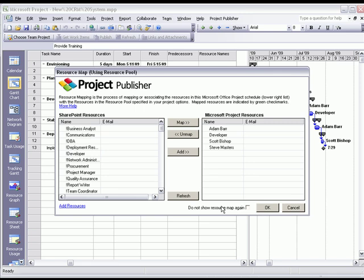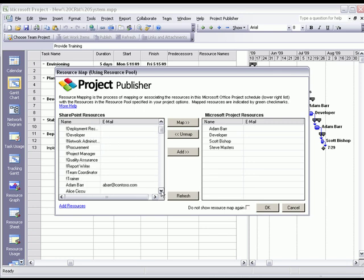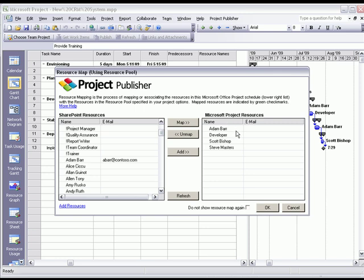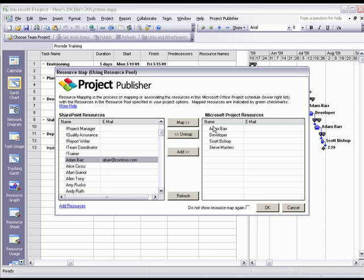Now the next step is to map your Microsoft Project local resources to the resources in EPM Live. The resources listed here on the left are in the EPM Live resource pool, and the resources here on the right are in this local Microsoft project plan. So what we're going to do is map these resources.